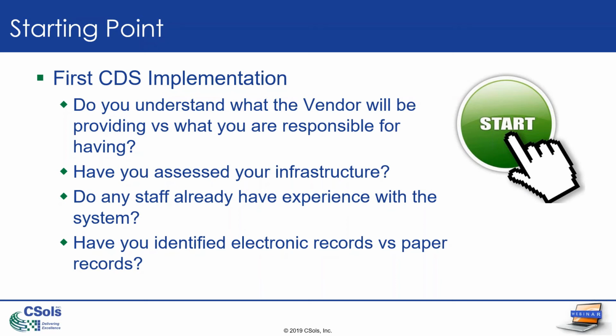And I talked about infrastructure. Another thing to consider is, have you assessed your infrastructure? And what I mean by that is, and I'll touch on it a little bit more when I get to the instrumentation portion of it. But obviously, if you're looking at implementing an enterprise version of a CDS or using it across multiple sites, multiple labs, do you know if you have the infrastructure set up to do that, or do you need to purchase things like server space?